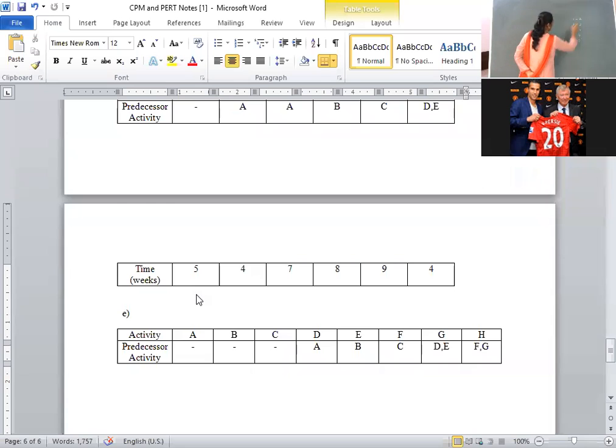1 to 2, 2 is completed. First, initially I have to complete 1 to 2, 1 to 3. Send 2 concurrent activities from node 1, that is 1 to 2, 1 to 3. After that, 2 is completed, then only 4. We have completed node 2, then 4. Next one is 3. Node 3 is completed, then only 4. Correct? Then 4 is completed, then only 5. That means end node is 5. This way we did the network diagrams earlier.